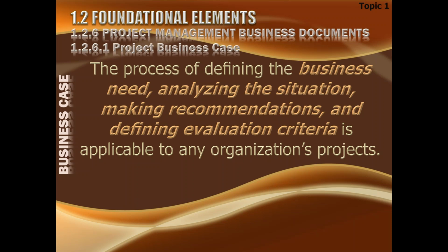So when you set out to create a business case, first define the business need. Why are you doing it? What is the requirement? Why do you need to do this? Then analyze the situation and give the alternatives and make your recommendations, and ultimately also define how this project, if started, can we evaluate it. The evaluation criteria should also be defined. This is the business case.